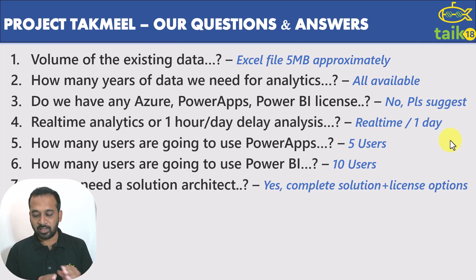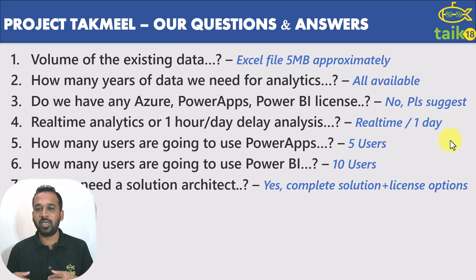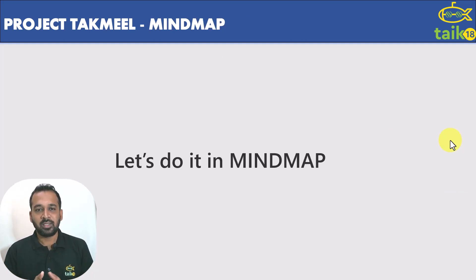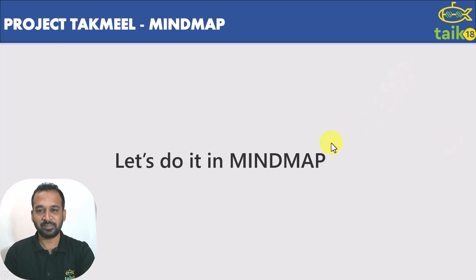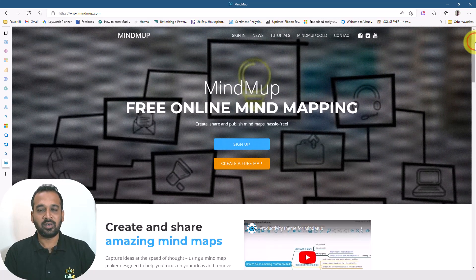Moving on — we have understood the business requirements. The next thing we need to do as a development company is to build a solution architecture, then resource planning and budgeting, and then submit the quote to them. If they are okay with that, they will give us an order. The next step is to do this in a mind map. Hope you're aware of mind map — if not, it's a good time to learn that. You're probably aware of Lucid chart and other chart tools where we can map process flows. Mind map is also one of its kind.